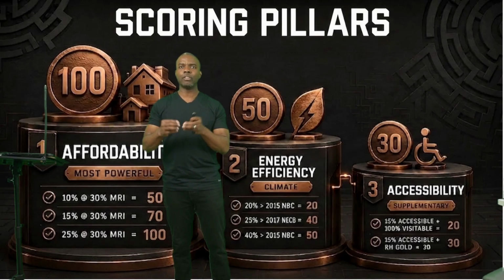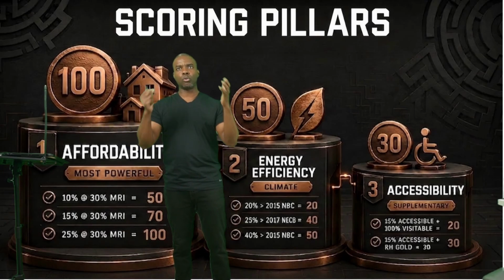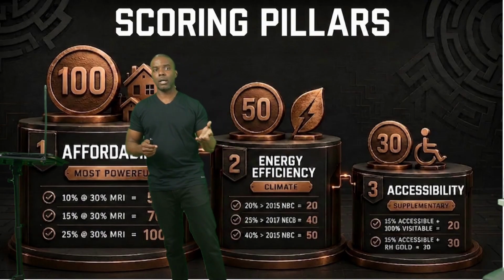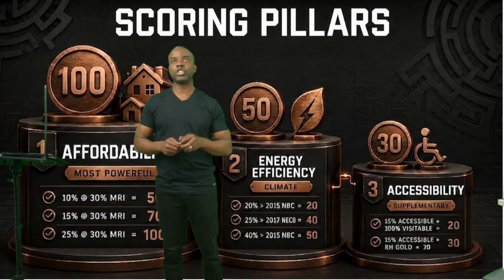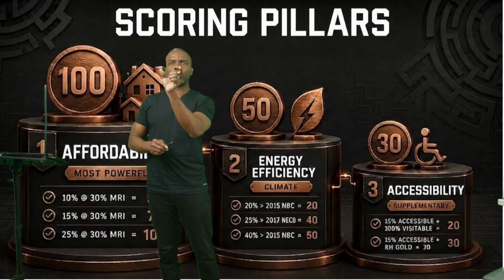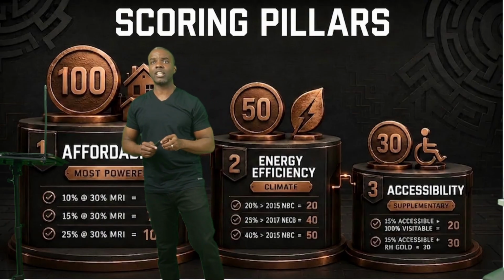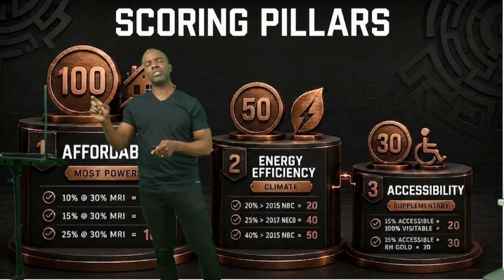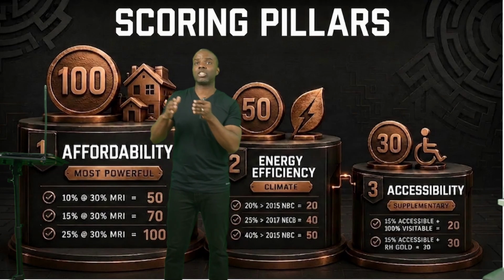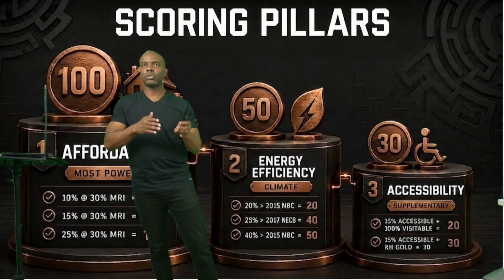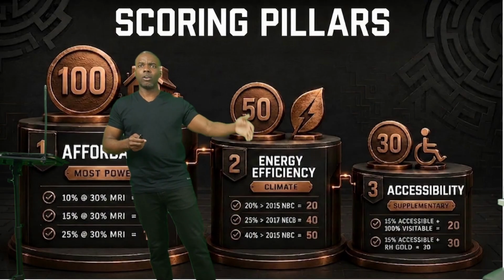Now, what does that mean in real terms, construction terms? I'm just going to ballpark this. Let's say it's $100 to construct a multiplex per square foot. With the 20% reduction in energy usage, you're basically adding about $1 to $3 per square foot of additional construction costs. So if it's $100, that's adding $1 to $3 per construction cost.